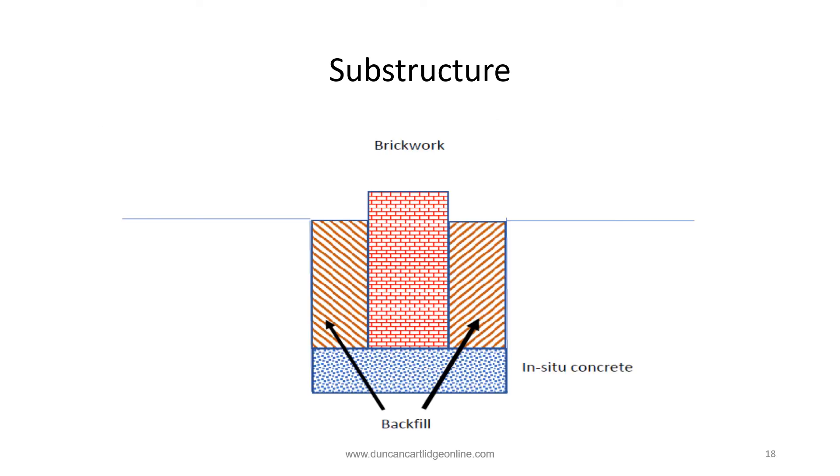When the foundations are complete the trench will have to be backfilled with excavated material as shown on this slide. The best way to calculate the net amount of backfill required is to allow for the trench to be completely filled with the material and then later when the concrete and the masonry is measured to deduct the volumes displaced to leave the net volume.